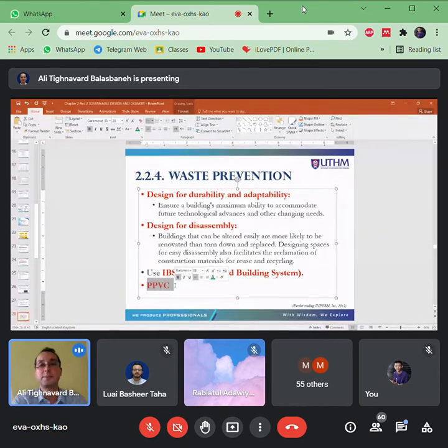We construct the whole building in the factory and then transfer by lorry to the site. But we do not assemble the whole building at the factory. They just create room by room. The bedroom is manufactured separately, and then transferred one by one.